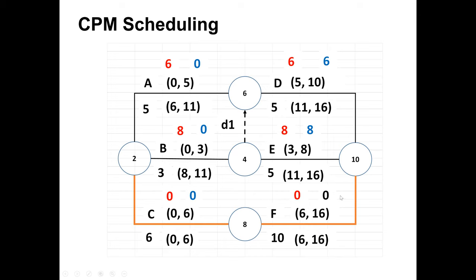Now see, free float is actually linked between two activities. For example, for B it is zero. Okay, when it's zero, it means if we delay this activity, there is no free time, and we cannot maintain the early start time 3 for the next activity. So here, free float for D is 6. So we can delay this for 6 days because there is no next activity that is going to be affected. So free float is a link between two activities. And if we want to keep for the